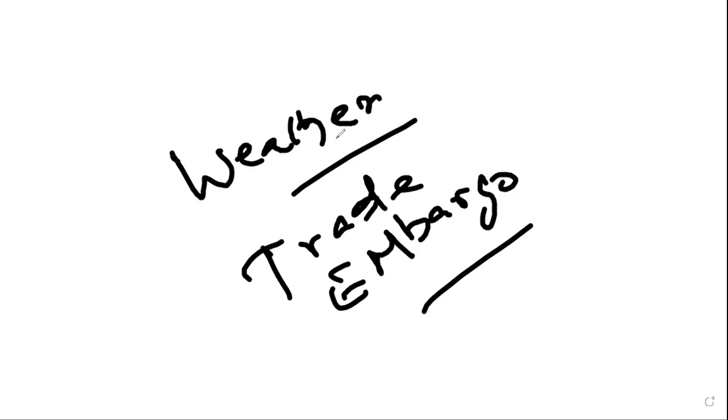Please note on the trade embargo. Once you are doing the procurement, whether you have a procurement relationship with the global vendors, you need to consider whether the government has any restriction in bringing that particular supplier into a project. That is called a trade embargo. You can't buy any kind of provisions. You can't buy any kind of goods and services. You are not allowed to bring that kind of goods and services into this country, or that particular country will not allow you to get the supply. Trade embargo is one of the important enterprise environmental factors, right?